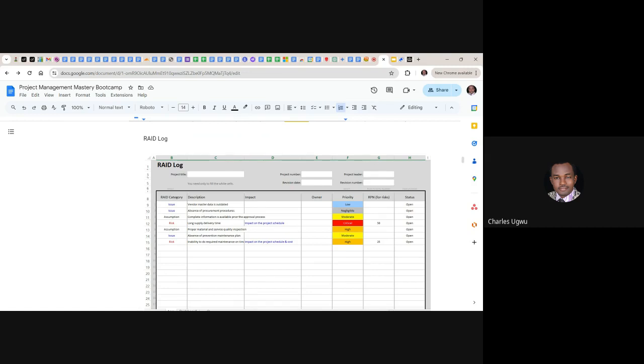And if these two activities are being performed by two different team members, you can see that the team member performing activity A is now becoming a blocker to the team member performing activity B, and that is a risk to the timeline and equally affects other resources.